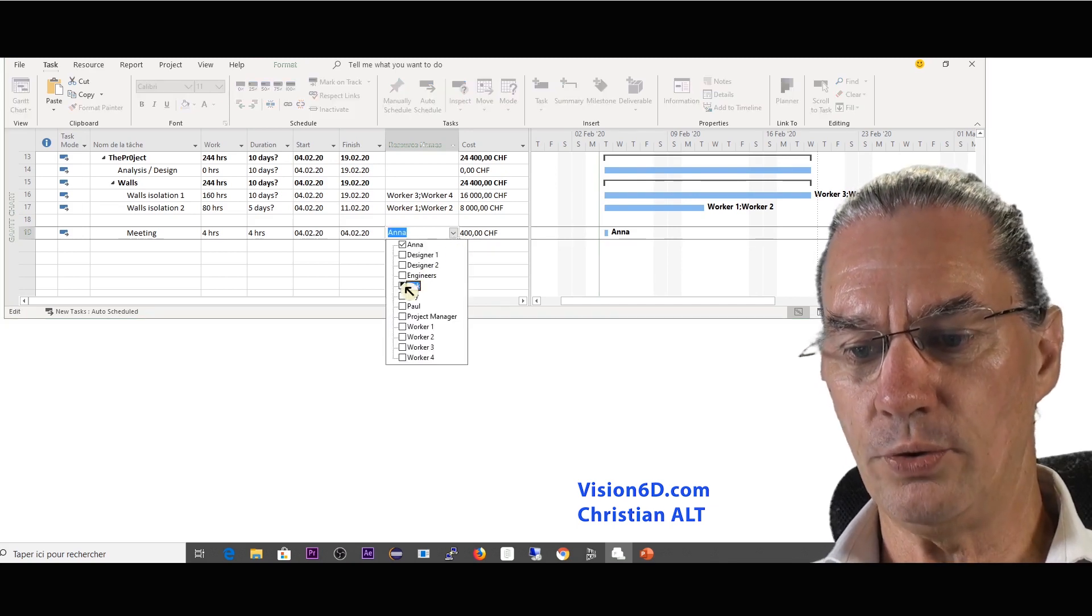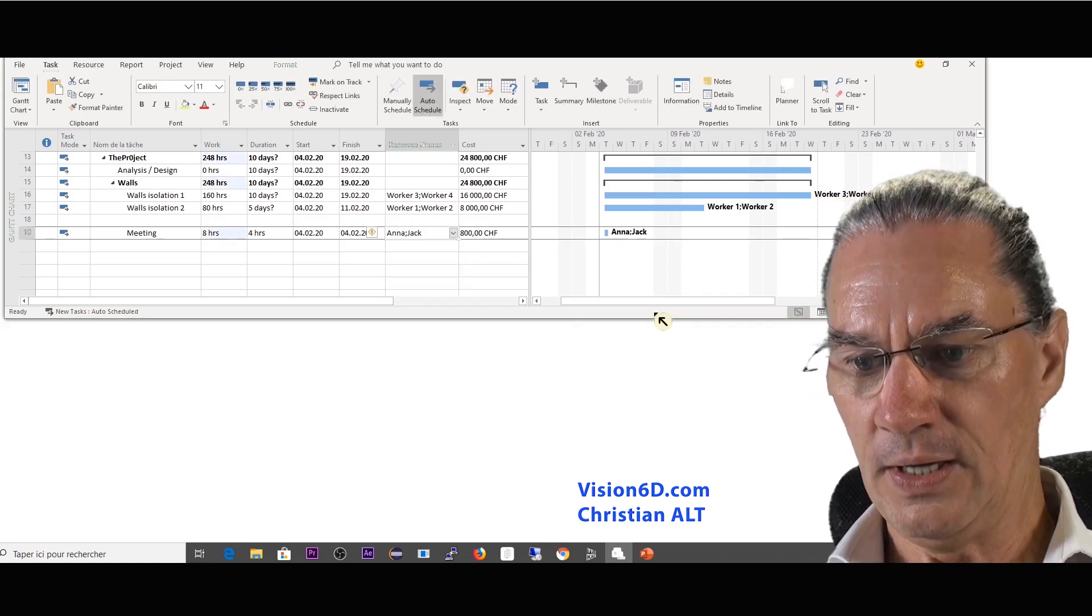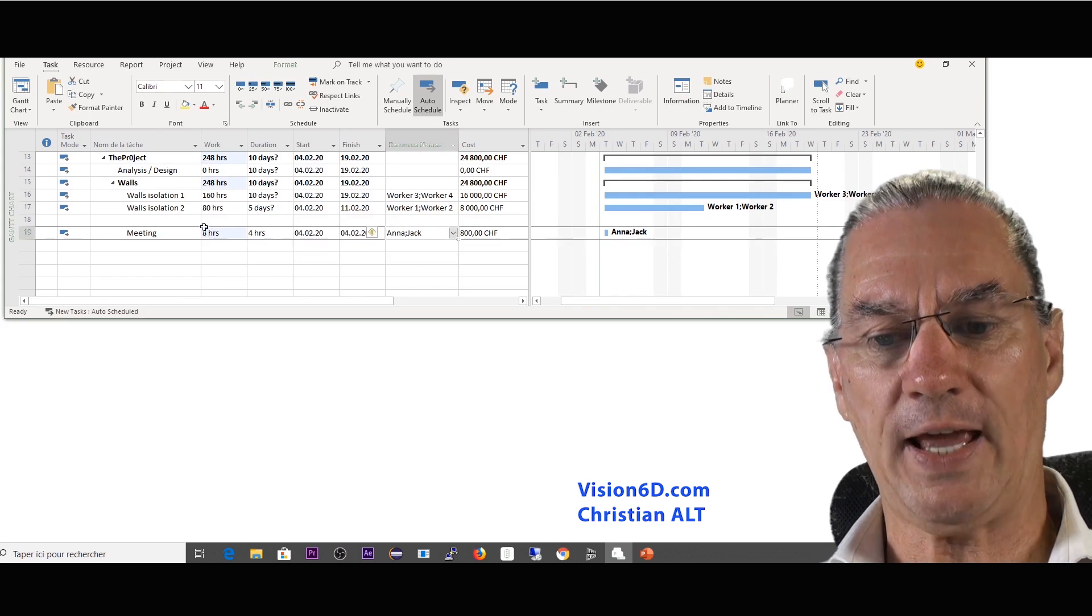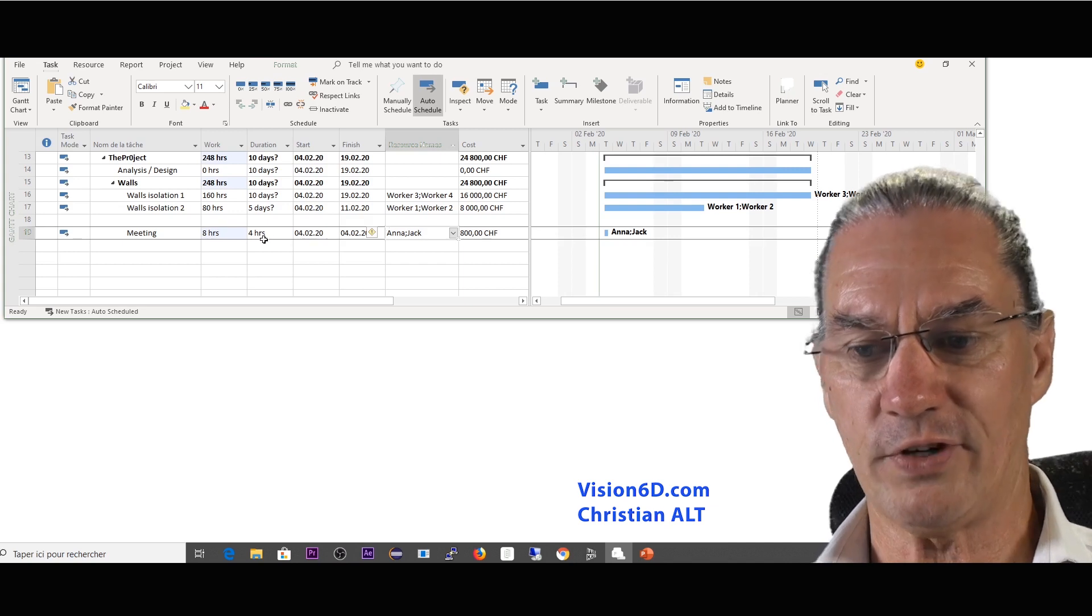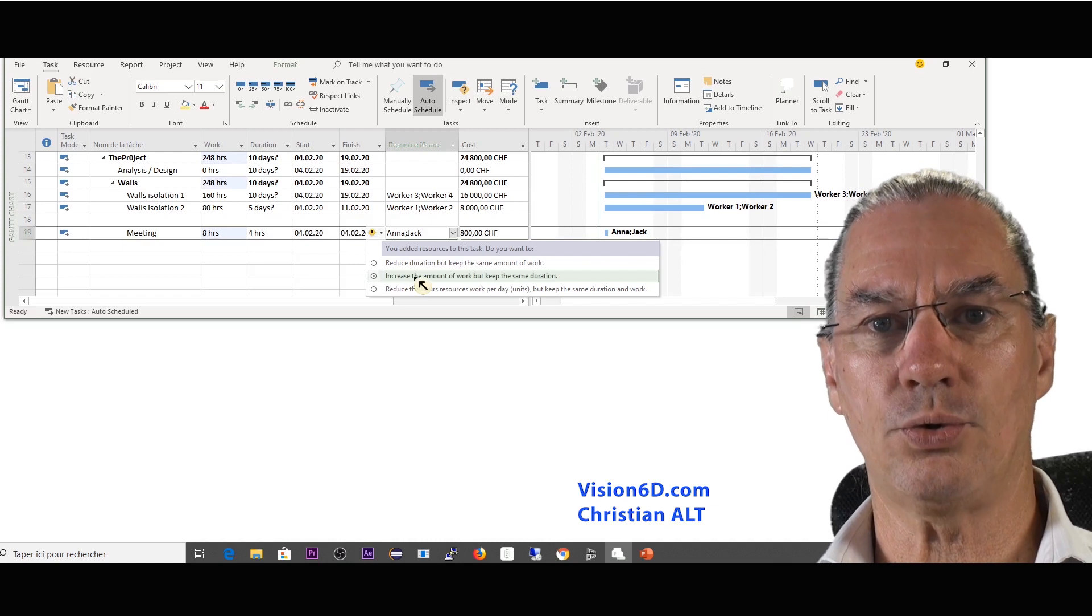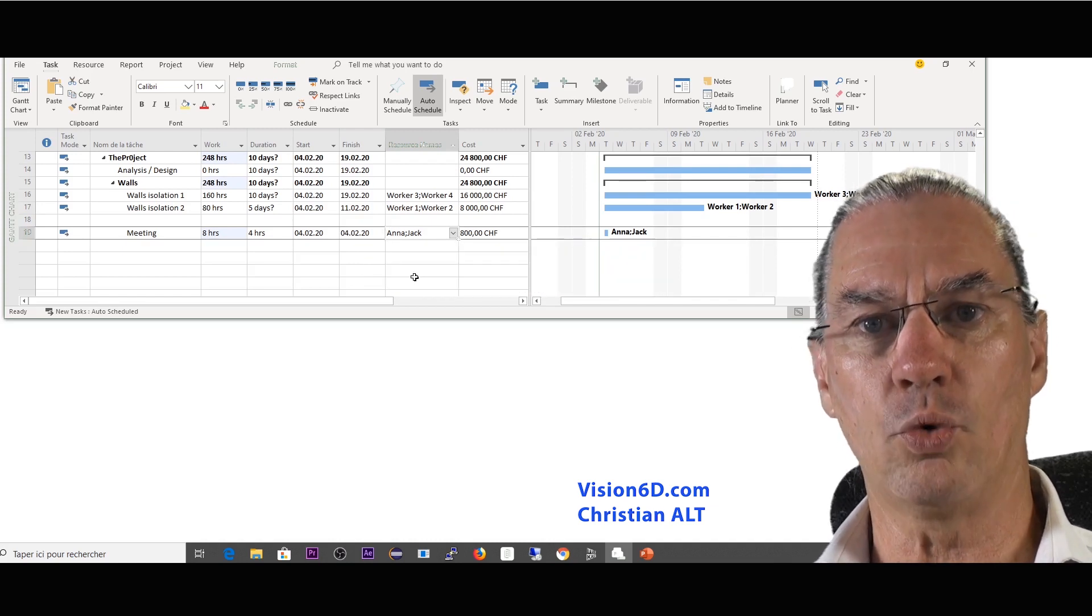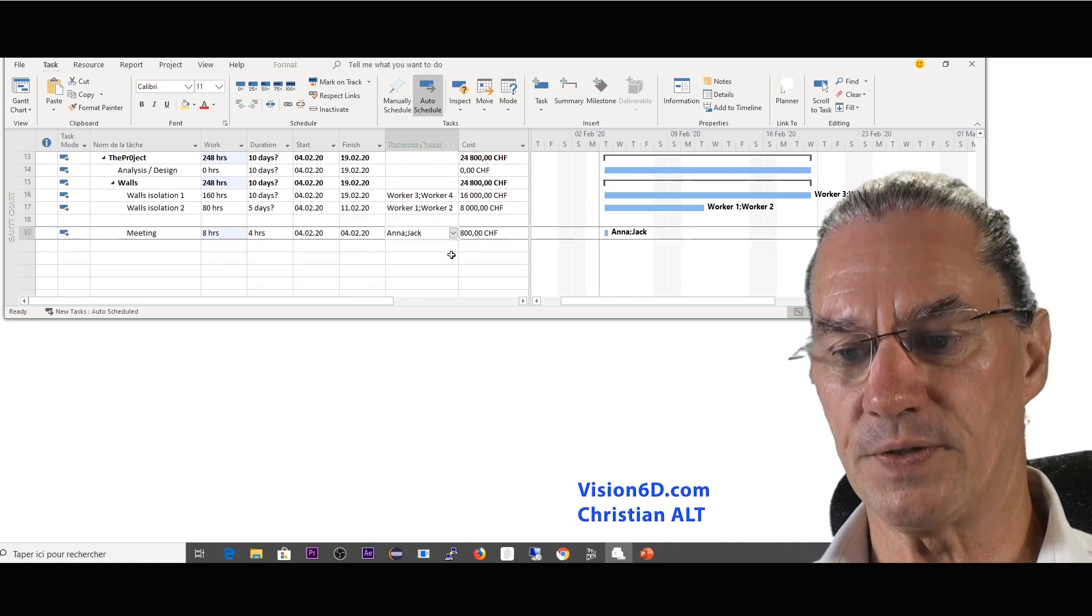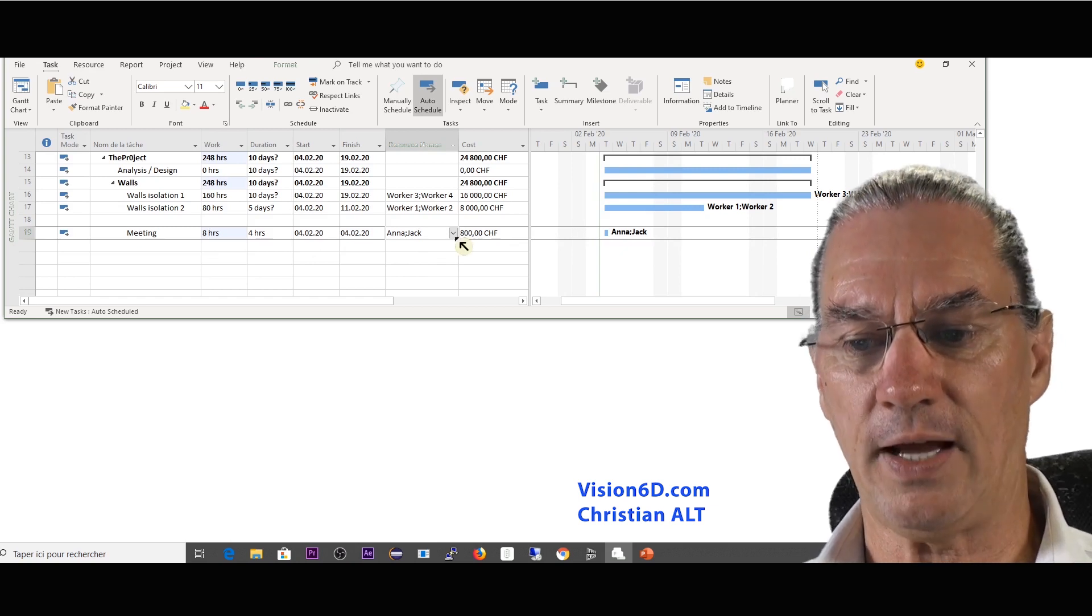Now what I'm going to do is that I'm going to add Jake to the meeting. So Jake is also there and you see that the work has increased. The duration is still the same. It's a working morning for example and here it's just telling us that it has increased the amount of work which is really what we want. We have more people in a meeting but the same duration. The total work has increased and we see that now from 400 it went up to 800.